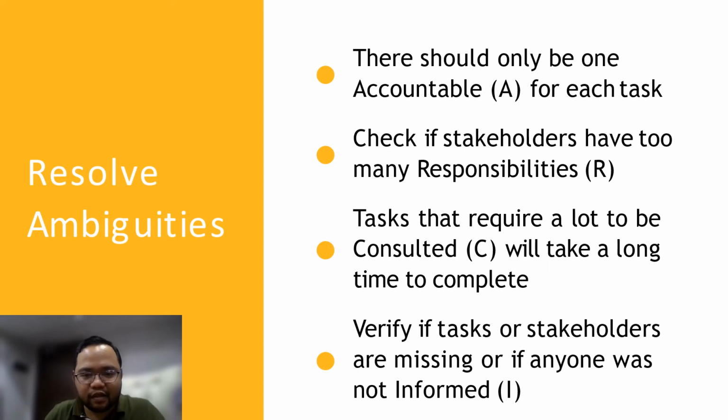What do we mean by this? For each and every step, there should only be one accountable person for each task. Why? Because having two or more accountable persons in a stage or in a task could probably lead to dispute.